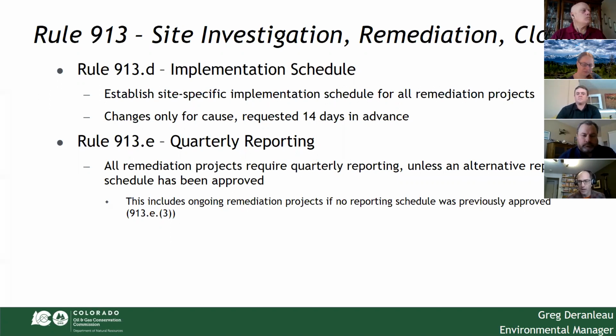the rule requests 14-day advance notice. So we want to know the major phases of your project, and when you're doing your significant investigation, when you're doing your remediation excavations, when you're installing a treatment system, what your monitoring schedule is, whether you're monitoring in the first month of a quarter or the third month of a quarter. And then when you're looking to have your remediation project completed and your reclamation commenced and completed. So we're looking for that whole start to finish of your project. We want you to be thinking about that from the start of your project.